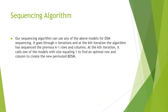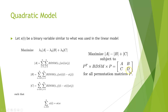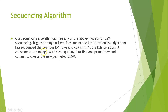Our sequencing algorithm can be used with either the linear or quadratic model for DSM sequencing. It goes through n iterations, and at the kth iteration the algorithm has sequenced the previous k minus 1 rows and columns. At the kth iteration, it calls one of the models with size equal to 1, going into the D matrix and permuting it to produce another set of sub-matrices A, B, C, and D within it — finding the most optimal row and column to create the new permuted binary design structure matrix.